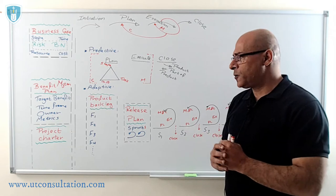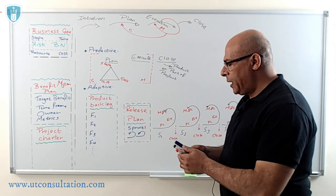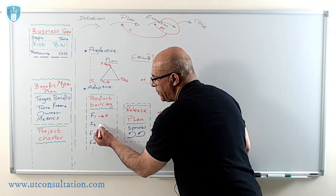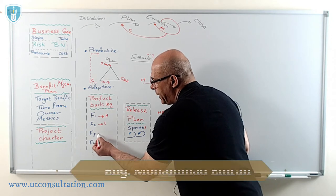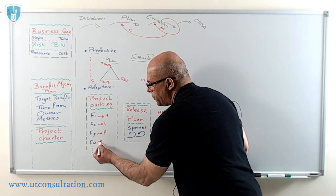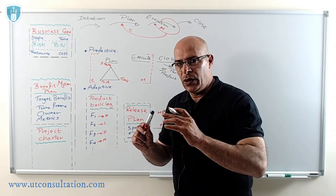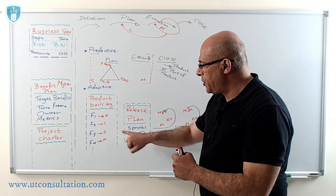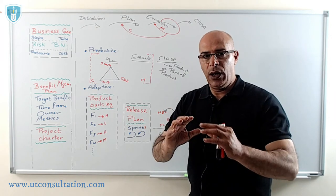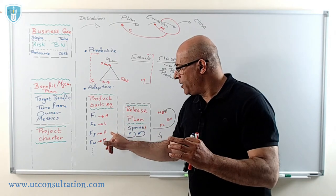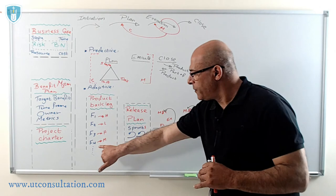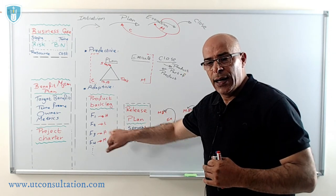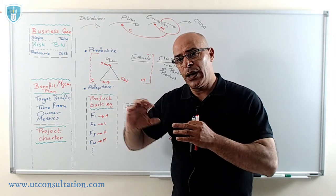To simplify: after doing prioritization, suppose feature 1 is the highest priority (high), feature 2 is low, feature 3 is high, feature 4 is medium. There will be three sprints. Sprint 1 will produce the high-priority items: feature 1 and feature 3. Sprint 2 will work on feature 4 (medium). Sprint 3 will work on feature 2 (low). You are producing the product based on business value — the highest business value features are delivered first.